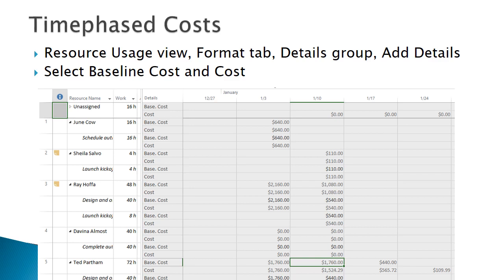Try applying the Cost Over Budget filter too. If you do so, you will find you need to create another custom filter for resources. This would work equally well with the task usage view and show the tasks over the resources in a time-phased view. You have a complete set of tools now to detect and analyze cost variances.